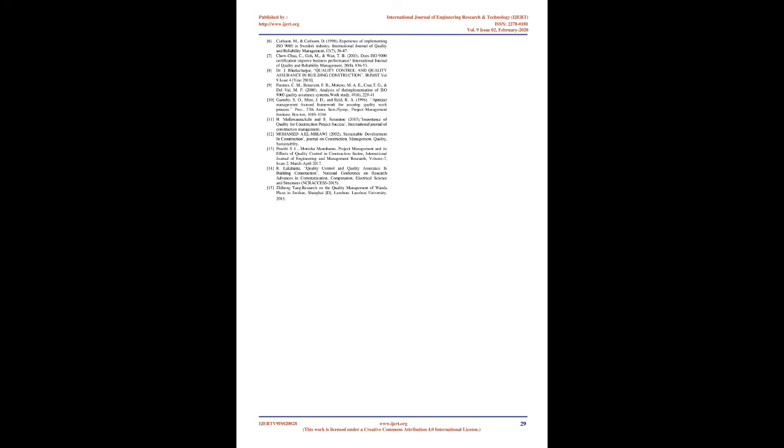Quality assurance is not an optional extra but a philosophy that management must be committed to. A quality assurance system to have any credibility must comply with ISO 9000 and ISO 14000. The construction specification in similar projects to be executed in future should be modified based on lessons learned during quality control exercised on previous projects. Quality of work largely depends upon the quality of materials to be used and workmanship. The relevant specifications in respect of materials and workmanship given in various IS codes must be strictly adhered to for accomplishment of QA/QC.